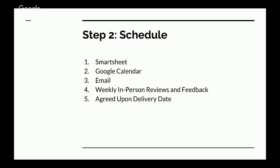Because the design partner is based in New York, and fostering this intense collaboration, we had weekly in-person reviews and feedback. And then finally, we had to decide upon a delivery date. In a lot of cases, this is not an open-ended thing. It's not like, how long will it take to develop? Fantastic, let's set it at the end of development. It's more like the client usually has some big presentation or unveiling already planned, and that's what we're working towards. In this case, they did, and we were working towards that launch date.